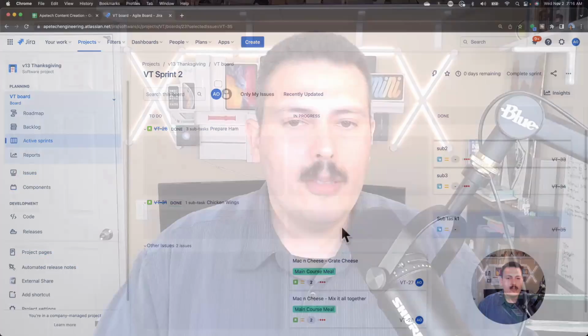So long story short, when you're thinking of a task and you're coming in from the world of Agile, you probably are not thinking of a task in Jira. What you're most likely thinking about is a subtask in Jira. So you want to go and leverage that. You want to reserve the regular task, the one that actually has a little check mark on it, for non-value added work, and you want to balance it between value added and non-value added.